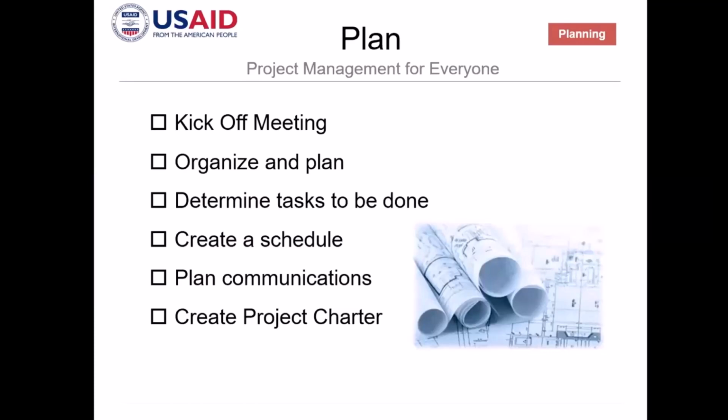But this is how you organize the plan before the project is authorized, right? So normally, during your initiation phase, you will have a kickoff meeting. You will have an organization and plan for it. Determine all the tasks or major activities that need to be done. You should create a high-level schedule, and also included in the project charter is how you're going to communicate or maybe publish status reports as a draft, right? And you will have to create the project charter document.